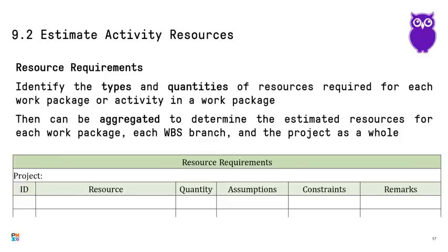But identifying stakeholders, you will need to identify most of them not by category, but by name and by role and responsibility. The other thing is that stakeholders you will know by their interest and their power, but this is not part of identifying resources. For resources, you need to know them by qualifications and by quantity, rather than by their interest and power.